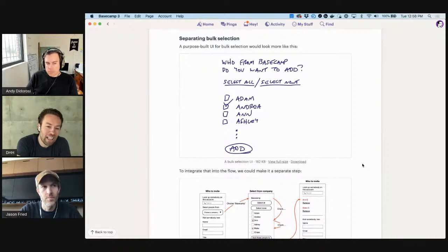Then we go, maybe not. Now is not the right time. We don't have the bandwidth to be able to do that. But you need to be looking at something that's close enough to real in the sense of like, what would it actually take to implement this? Now, these are high levels, so there might be all sorts of UI fidelity you want to layer on top, but just the basic modeling, what does it take to get from what we have to where we need to go? The pitch has to answer that, but just that and no more.